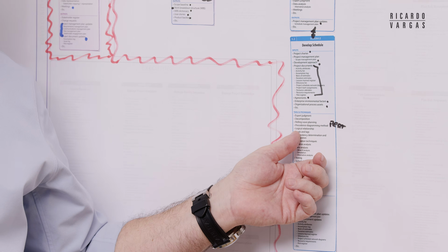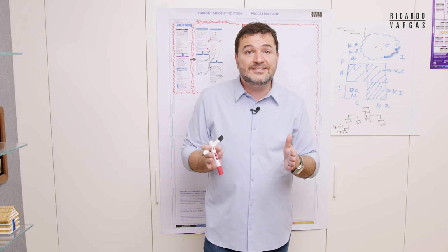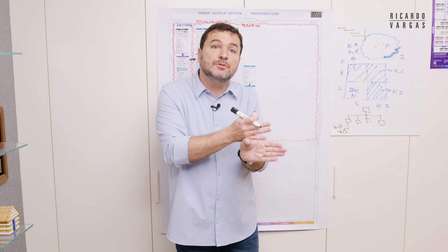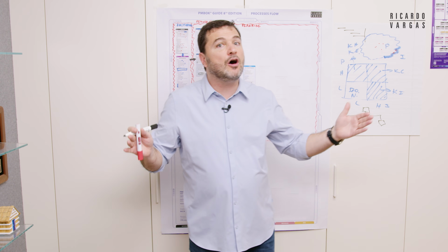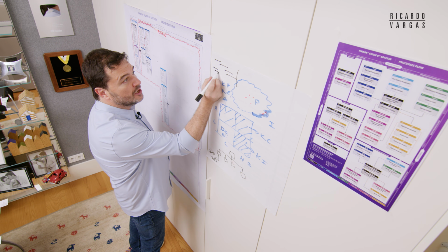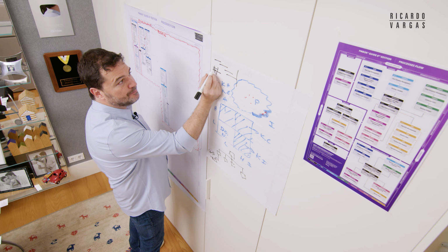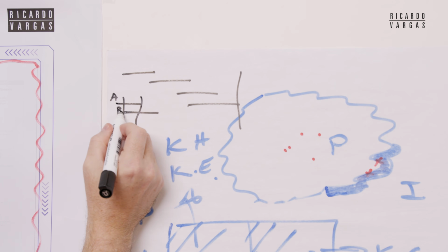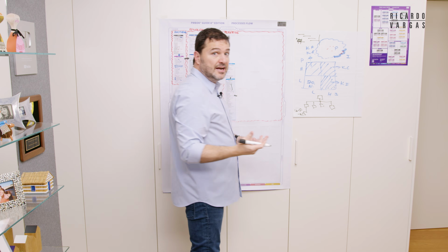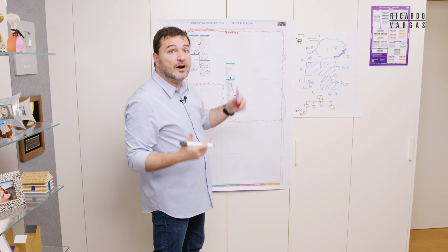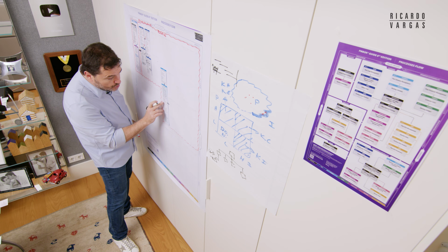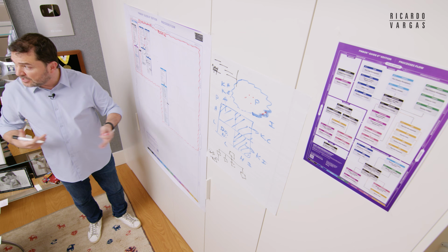Leads and lags. For example, sometimes I have a lead time. I put buffers or I put superposition on tasks. And this will, of course, have an impact. If I do like this, or if I do like this, and I put an overlap, this is task A and this is task B. If I put an overlap on these tasks, of course, I'm saving time if these tasks are on the critical path. However, I'm adding risks. So I need to use this type of technique depending on the case.